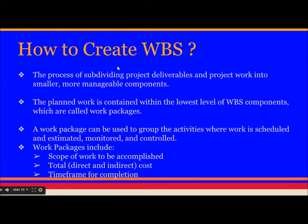How to create a WBS: it is the process of dividing project deliverables and project work into smaller and more manageable components. The planned work is contained within the lowest level of WBS components, which are called work packages. A work package can be used to group activities where work is scheduled, estimated, monitored, and controlled. Work packages include: scope of work to be accomplished, total direct and indirect cost, and timeframe for completion.